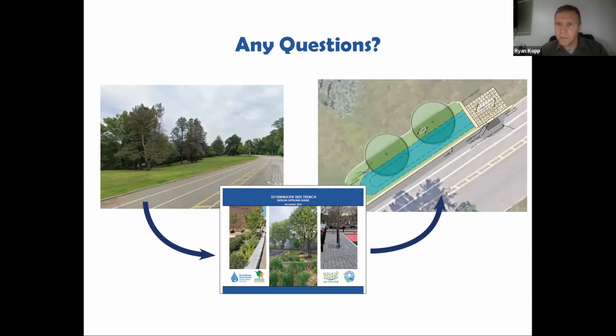One final question. It says, what funding sources is Providence using to implement stormwater infrastructure? So because of the consent agreement from DEM, it was a capital improvement plan bond issue that funded not only the 42 sites that we installed, but also improvements to playgrounds and rec centers and a bunch of different initiatives across the city. So it was a public bond that went out that gave us the $1.5 million to do the work that we've done so far. It was to answer the consent agreement.